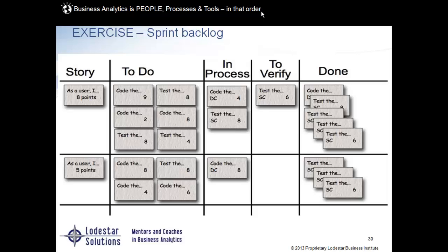And we are going to say, I will build this user story and this user story in this sprint. Sprints can be 2 weeks long, they can be 4 weeks long. It just completely depends on your organization and the requirements of the project. Industry standard is about 2 weeks. That's fairly common. Probably 80 to 90% of the projects are done in 2-week sprints.